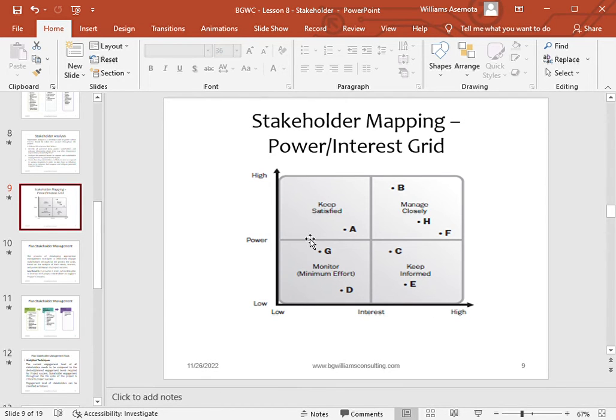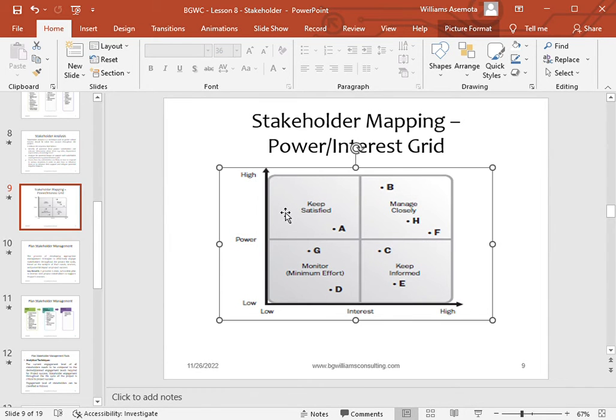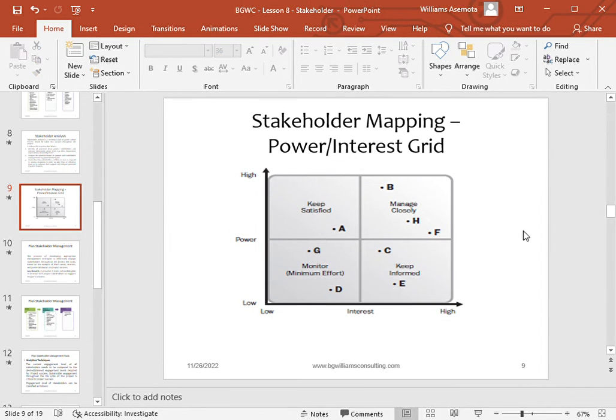So which means what PMI, the Project Management Institute, is saying is that if you have successfully classified your stakeholder and you have planned how you want to engage each of your stakeholder, how you will manage everything. Now, what they are saying is that all your stakeholders that have high power but low interest in your project, the best way for you to engage them is to make sure you keep them satisfied.